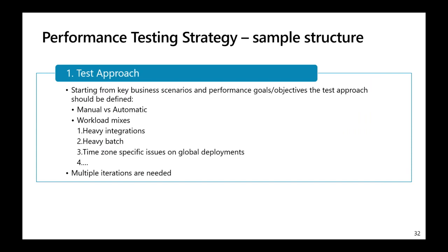As mentioned before, performance testing is very rarely a one-time activity. Mostly it's an iterative process. If a low effort performance testing approach isn't available, it can be tempting to skip performance test iteration to gain time, which is not recommended at all, because the risk is that you go live with a system that doesn't perform. On the other side, you can have a fully automated process, including environment provisioning and data setup, that can be executed frequently with minimal effort and provide a clear picture of variations in performance in response to specific changes.